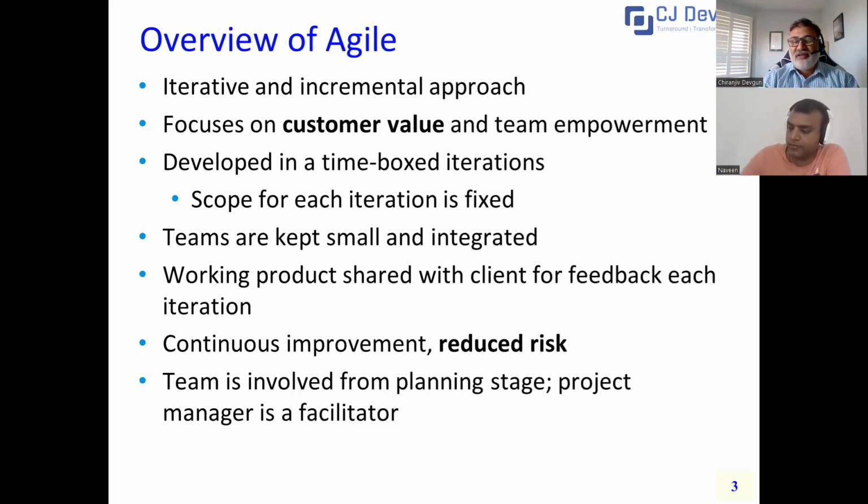And the development team, so if there are 5 stories that are prioritized by the product owner, then you say, okay, can this story be done independently? Yes, then good, we can do it. Oh, this story cannot be done till I do story number 4. So even though you, Mr. Product Owner, think this is priority 1, I cannot do this till I do 3 and 4. Therefore, it has to be deprioritized, and then we will do it.